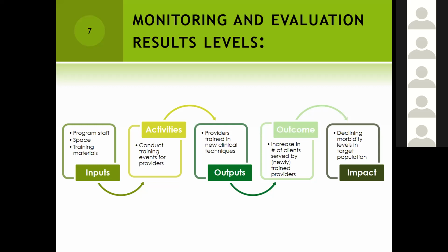And from the outputs, we are able to get to the outcomes. That is, a good outcome is that once you train your providers in new clinical techniques, we expect that there will be an increase in the number of clients that are served by the newly trained providers, which is a critical outcome and a good indicator for measuring whether the outcome has been achieved. And we'll be coming into indicators later on, just to clarify what exactly we mean with that.